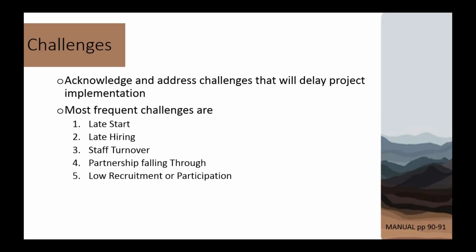So you're already a little bit behind, but as far as ANA is concerned, your start date was still 9/30. So how are you going to play catch up? Especially with things that are tied to other calendars, like school calendars, you may already be behind the eight ball, and it'll be really hard to catch up. So what are you going to do in that case? I suggest having a contingency plan for a late start is a must in this environment.